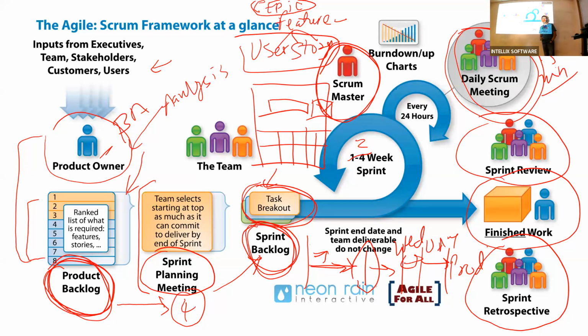Question. If they find any major bug at the end of the sprint, can they move it into the next sprint? Yeah, they will always keep on moving. They will document the bug. They will pull it in along with the stories because it has to be fixed in order to have working software. Then in the sprint planning meeting, they will say, oh, we gotta fix this bug, and pull that in along with a couple of other stories. When is it going to be fixed, if they move it to the next sprint? Next sprint, it will be fixed next sprint.